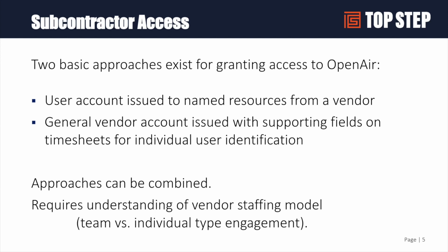In that scenario, maybe you just set up one user account for that particular vendor, and then have the vendor or someone enter on behalf of the vendor the time and or expenses for that one license. You can use the notes feature to enter which of the contractors did the work. So you have some individual visibility there, and you're only paying for one license versus multiple, and still being able to bill that time and also capture those costs to your projects.